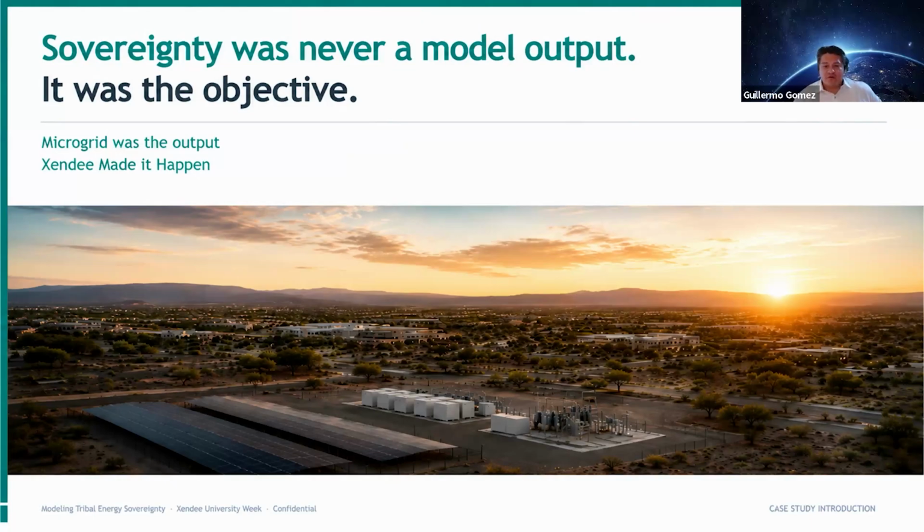There's the whole tariff thing, right? Having to figure out the tariffs with the changing landscape. And so the answer to that question is yes. Our company isn't necessarily doing a ton of these projects, and so we're not buying a lot of this equipment in bulk. Maybe due to that, we also get longer lead times. But to answer your question, definitely a critical piece. We're looking at about 2 years for our longest lead time piece of equipment.